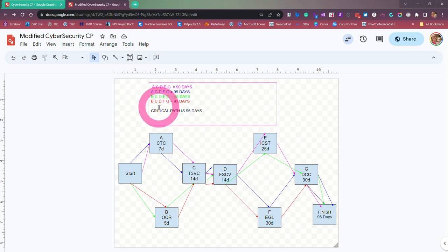And then the last path was my red, okay, so I started with B, and I went to C, and then we went over to D, okay, so we're always going to C and D here. I'm never going to B and A though. Those are 2 separate tasks that are on different paths, okay. So in other words, A can be going on possibly sometimes while B is going on. All right, so now if I come over here, I was on the red, so we come to D, and then I go down to F, and I go to G and finish out.